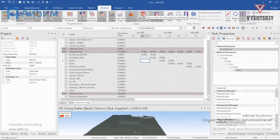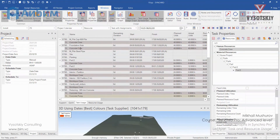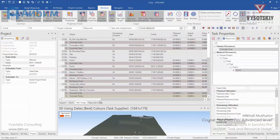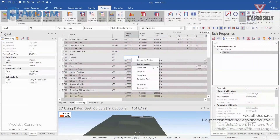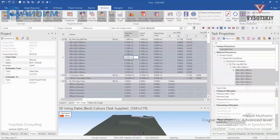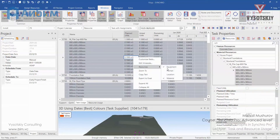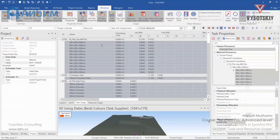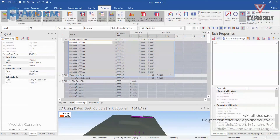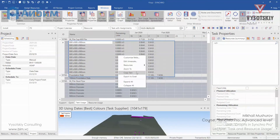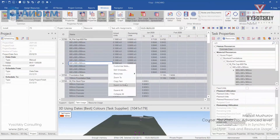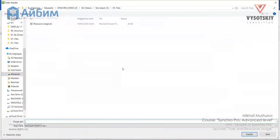The same goes for the task usage spreadsheet. Here you can define your columns and time scale. Make a right click and select resources to display — for example, material only. These are the activities and these are the assigned resources. You can see the distribution per time period. You can copy from here or export the entire table to Excel.